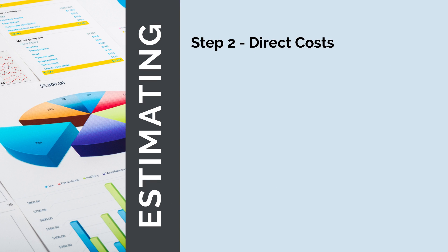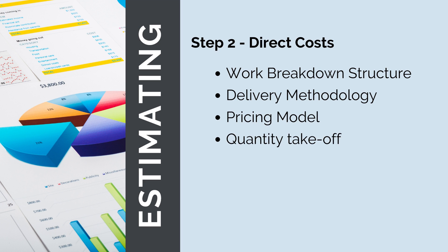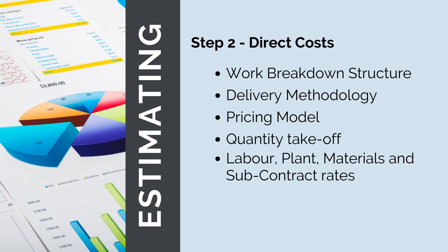Step two is to calculate our direct costs — the costs associated with completing all the project scope. Now that we have a good understanding of our project scope, we need to complete our work breakdown structure, breaking the project down into component pieces to fully understand all the work to be done. Next, we'll establish our delivery methodology: the best way to deliver all this scope. Once we've worked out whether we'll be subcontracting or self-performing the works and the commercial arrangement, we can calculate our direct costs. We'll set up our pricing model, complete a quantity takeoff, calculate labour, plant, material and subcontract rates, then estimate productivities to calculate total costs for each activity, combining them to get our overall direct costs.